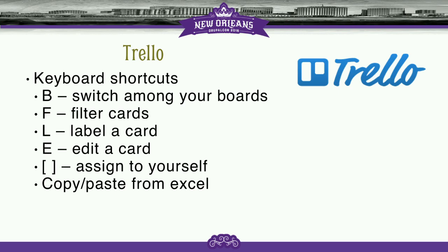There we go. Another one is if you have multiple tasks, because you're often starting a board from scratch, you open a new board. If you have a project that you do over and over again, build one board as your template and then copy and repeat that. So you don't keep repeating entering everything in. If you do have a long list that you want to bring in, you can open up one ticket and copy and paste from Excel, and it will automatically spit it out as multiple cards. So you don't have to keep copying and pasting each one into its own line. All right, so that's Trello.